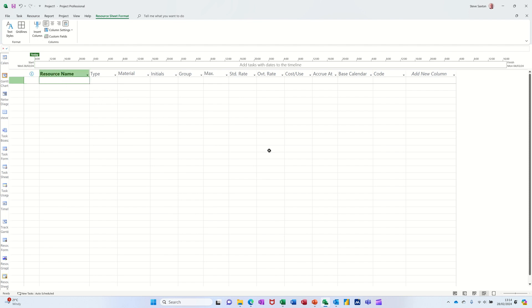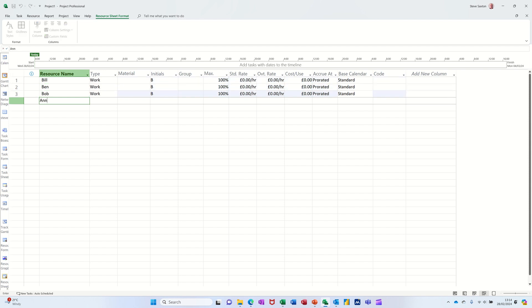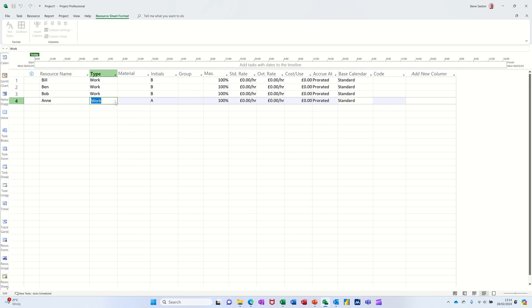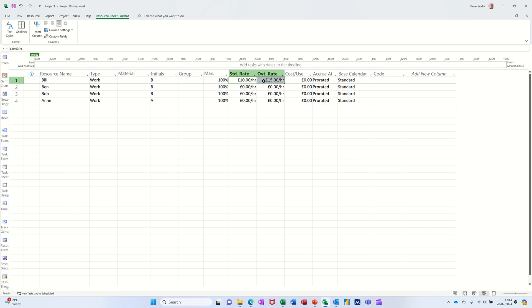Now if I just do a few resources — I'll just do Bill, Ben, Bob and Ann. These are work resources and that's the default, defaulting to work. If they're at 100%, that means they're available the whole time; 50% would be half the time, etc. I'll give them some wage — £10 an hour, £15 overtime. If everybody's on the same rate, you can highlight those two, get the little black cross and pull that down so they're all on the same wage.